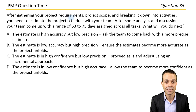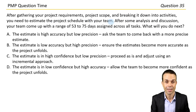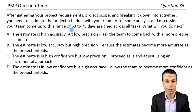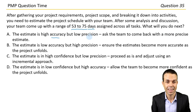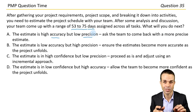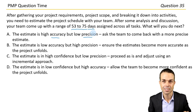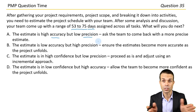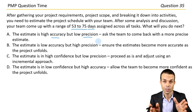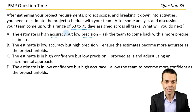After gathering your project requirements, project scope, and breaking it down into activities, you need to estimate the project schedule with your team. After some analysis and discussion, your team come up with a range of 53 to 75 days assigned across all tasks. What will you do next? This is a question on accuracy and precision. Accuracy is the range — if it's a small range it's high accuracy. This is actually a pretty wide range, nearly more than 20 days, so the accuracy is quite low.